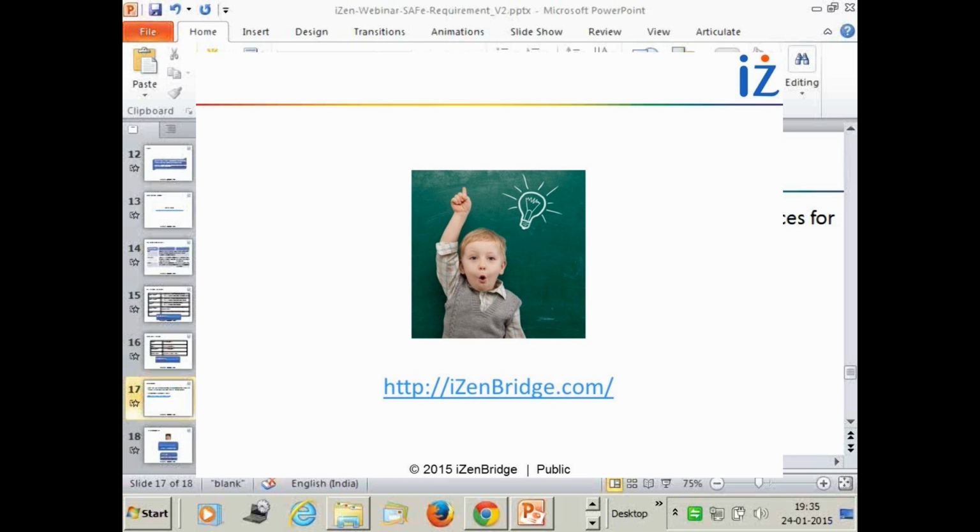We keep talking about the cone of uncertainty. You can talk about that at a business case level or an epic level. You have a rough order of magnitude estimate. Then at a feature level you may have a more budgetary level estimate, and at a story level you have more definitive estimates. So this is how you can visualize that estimates get refined as we get deeper. It's like progressive elaboration, which we keep talking about in project management.